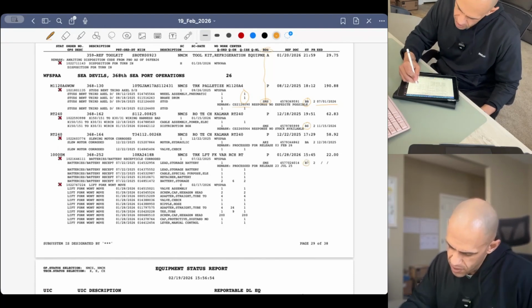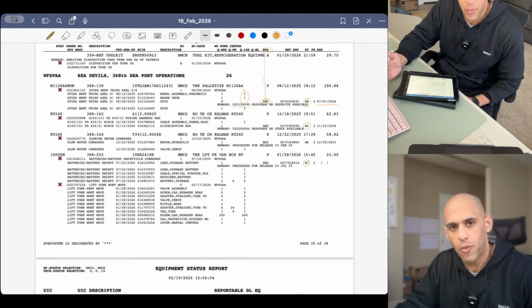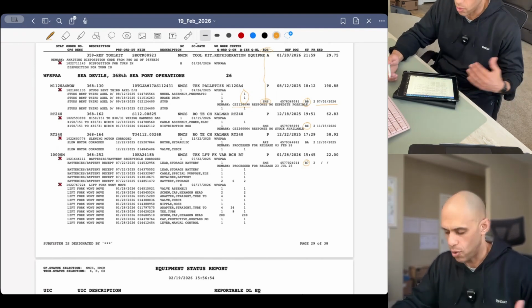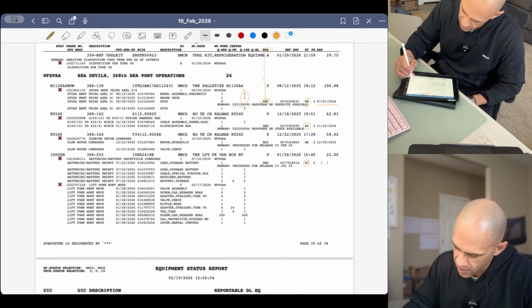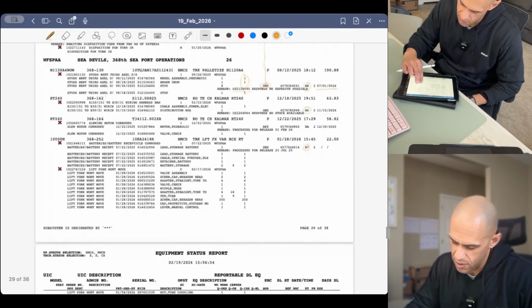A lot of the times with B7s, BZs, or BBs, you won't get much movement or traction on them because typically it's back ordered or there's a price adjustment or there's a change. It's beyond our control. When we see BA, we like BA status. BA status means that everything's been funded. It's in process for shipment.